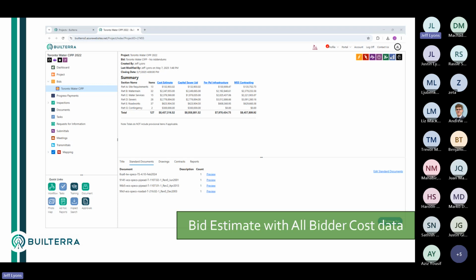They're really just sending the spreadsheet back to you. We do have a full-blown email system that will do this, but the reality is it's really just checking in the spreadsheet, and it knows how to compile it and compare it. So you'll have your cost estimate lined up against the 3 imported bids, and I forgot to mention, you can also attach standard documents, contracts, and reports as part of the entire bid package to the contractor when the time comes. So this would have been done when we sent out the schedule unit prices.